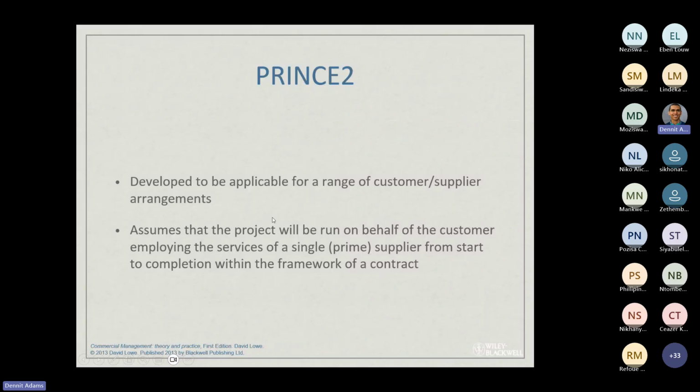It was developed to be applicable for a range of customer-supplier arrangements. So they're saying, not necessarily only project or product. It can be for a whole host or a whole range of things. It assumes that the project will be run on behalf of the customer, employing the services of a single supplier from start to completion within the framework of a contract, so that you won't have multiple. So that's the assumption there. It's the key assumption: you don't have multiple suppliers from the start.